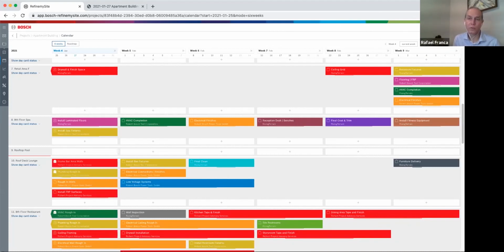But also, once we have the milestones implemented, there will be other KPIs which we'll be able to track to see the progress of the task or project as well. So there will be other different indicators that you're going to be able to see. Ideally, if you have a task, whether it's 2 days long or 8 days long, your foreman or last planner is able to understand, once that task is coming up in the next week, day by day, how that work should unfold.